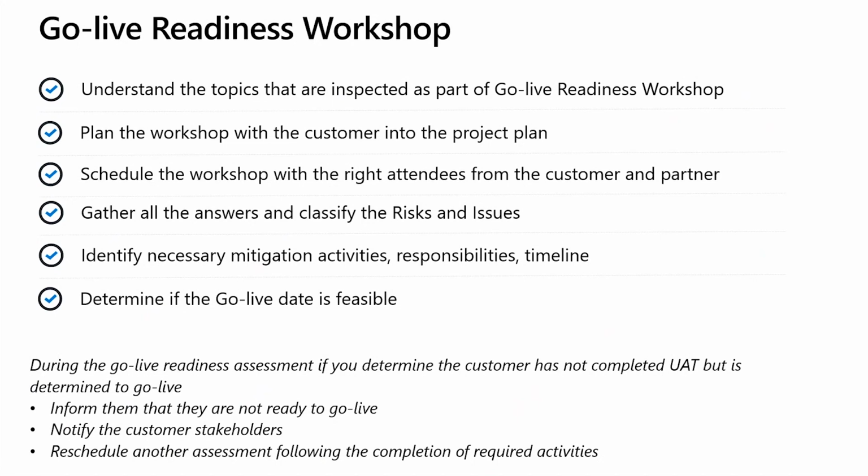Go through and collect all answers. Record and classify the findings, including the positive assertions and the potential issues and risks. You will build up a history of records proving a multitude of successful go-lives, and for any findings that require mitigations, you'll have a bigger chance of avoiding this the next time around.